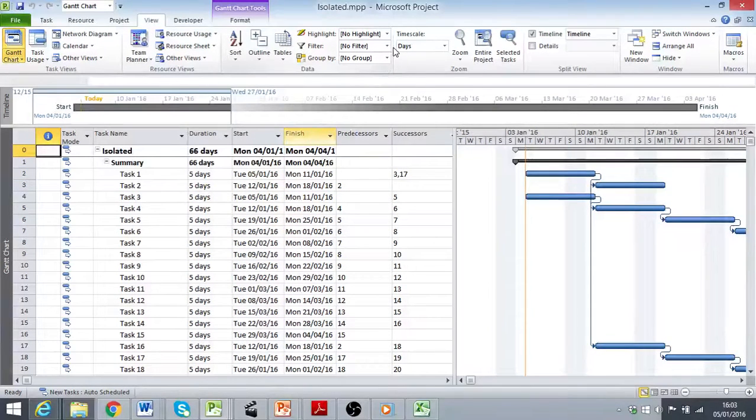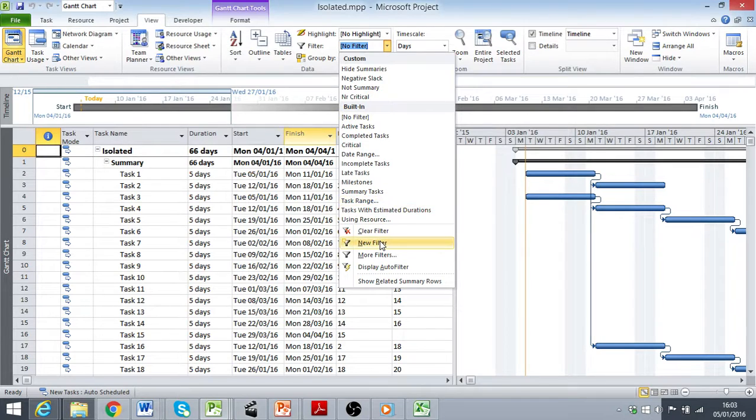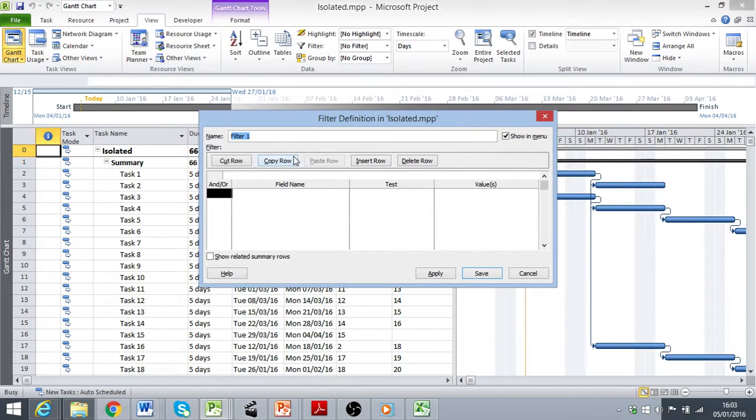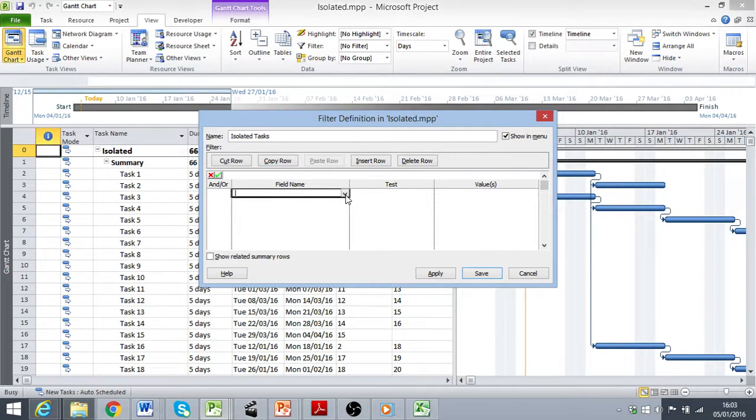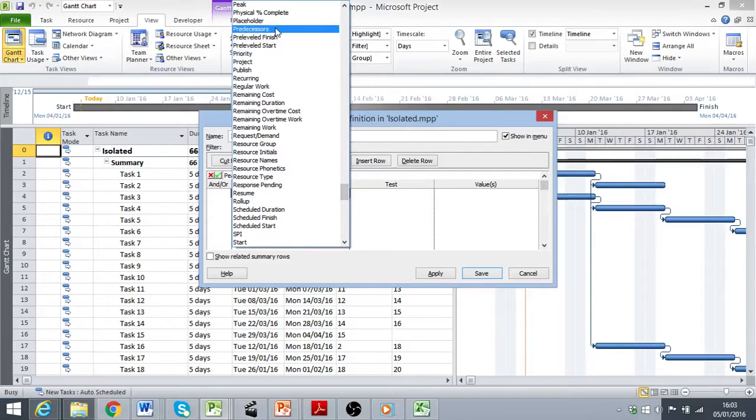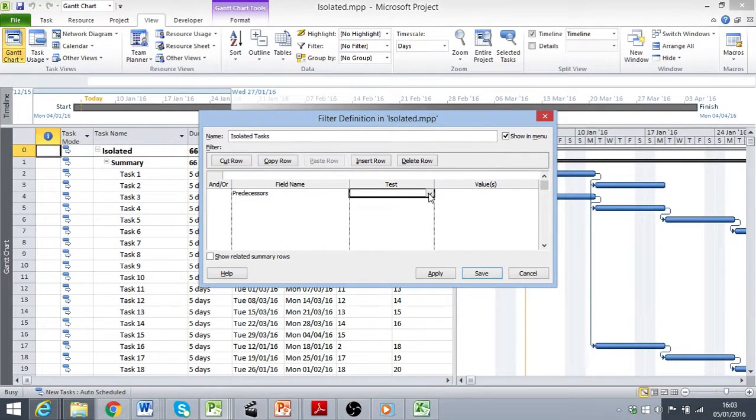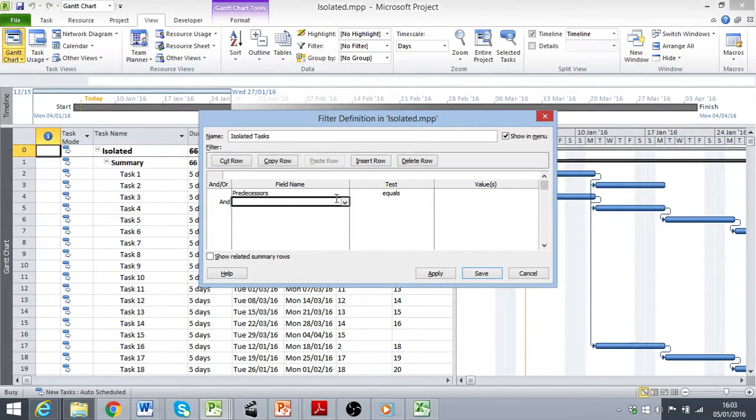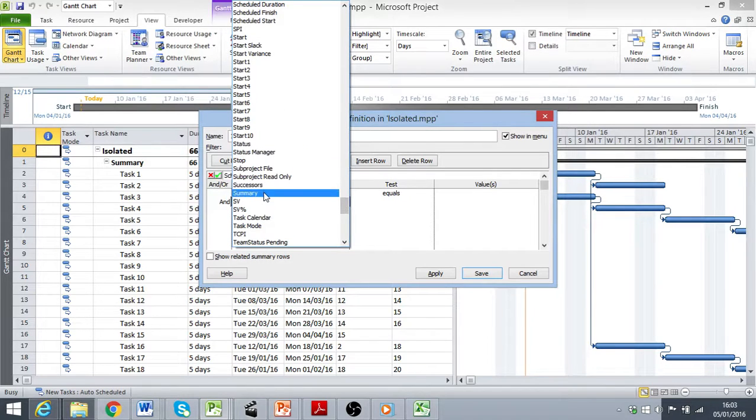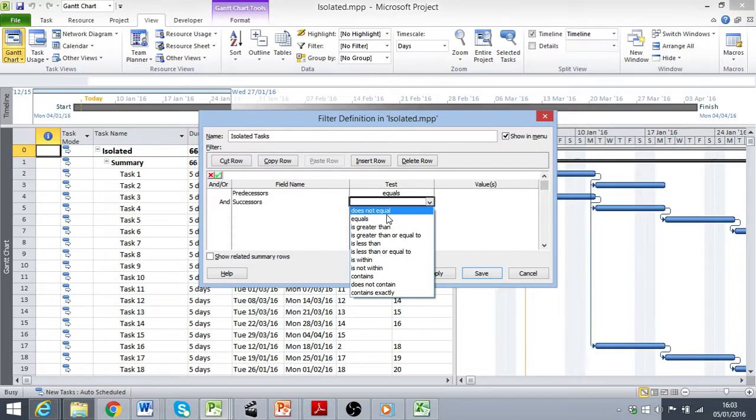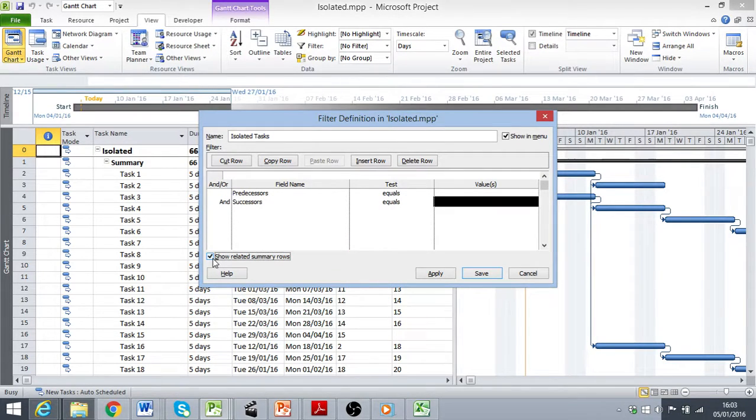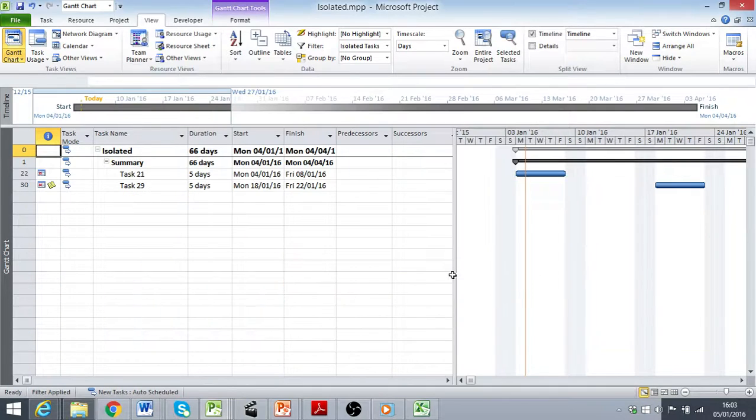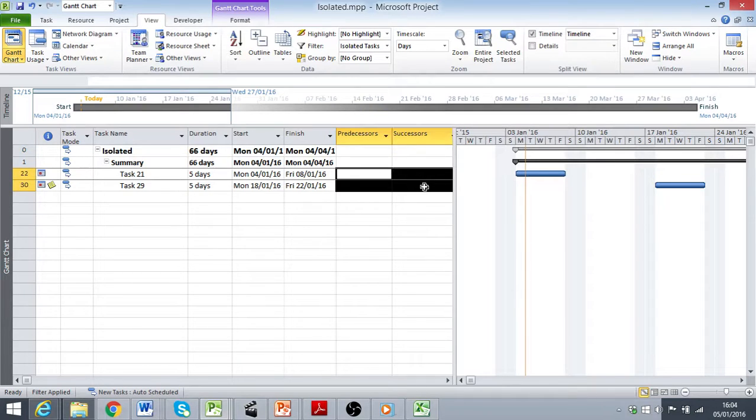To do this, I'm going to create a new filter. So click on the filters drop down, new filter, and I'm going to call this isolated tasks. The fields that we are interested in are predecessors, where this is equal to blank, and successors also equal to blank. I'm going to show the related summary rows, apply this, and that will filter my activity list to show just those that have no predecessors or successors.